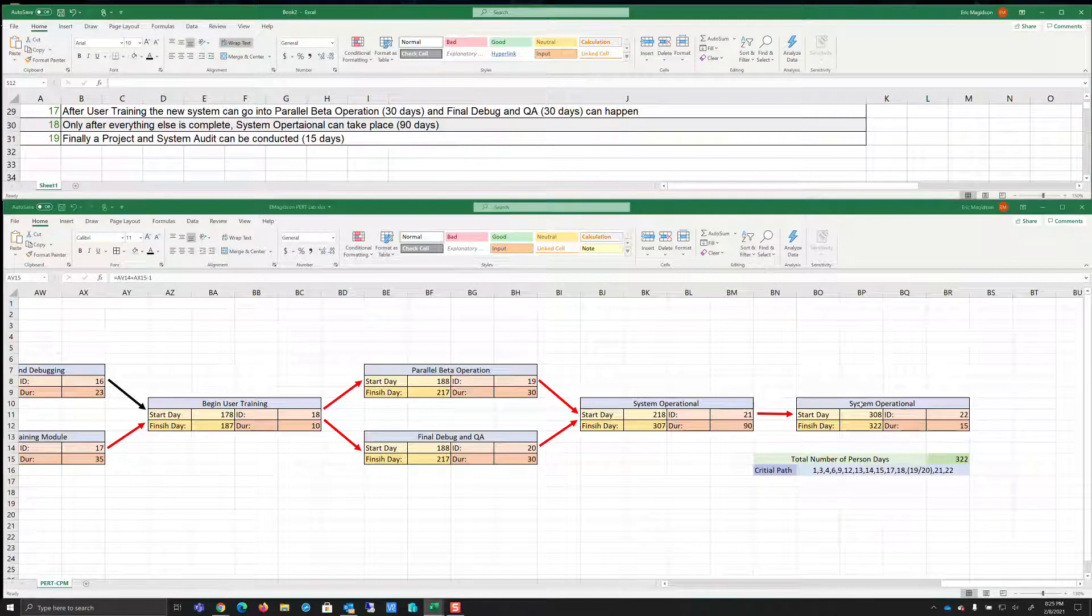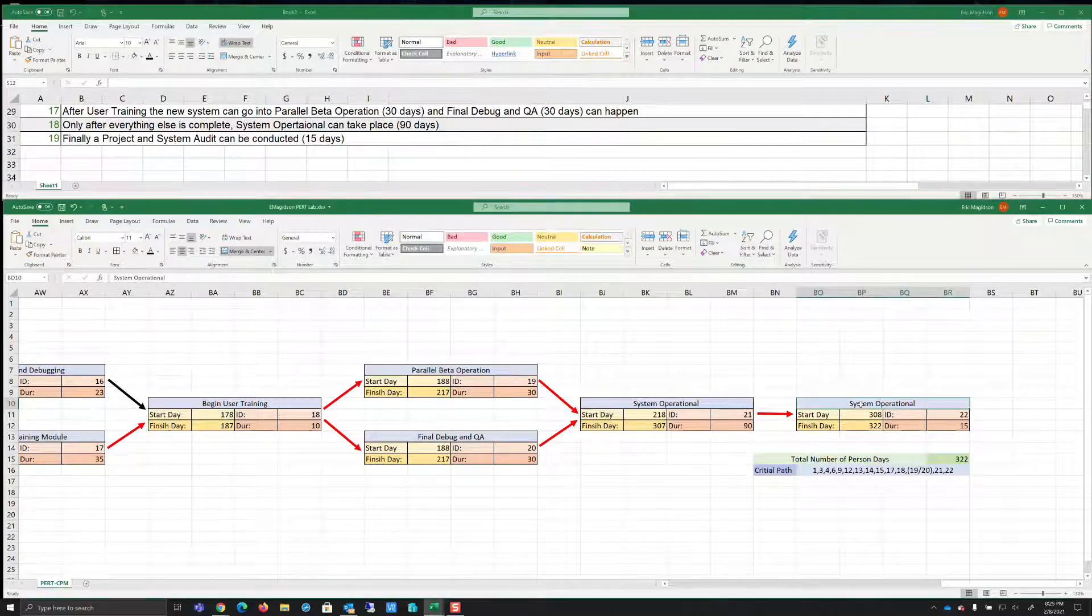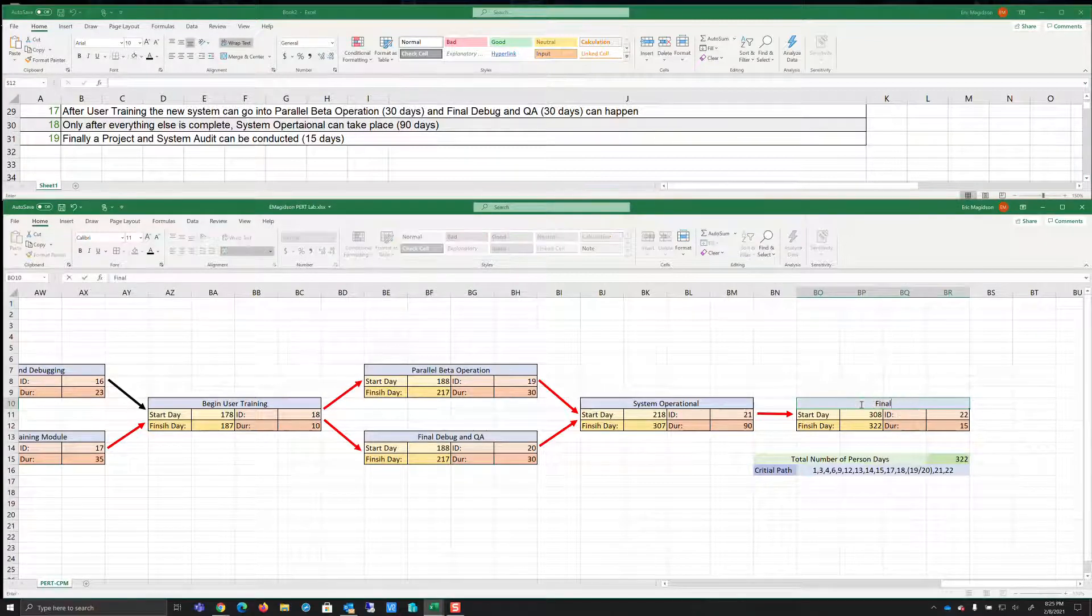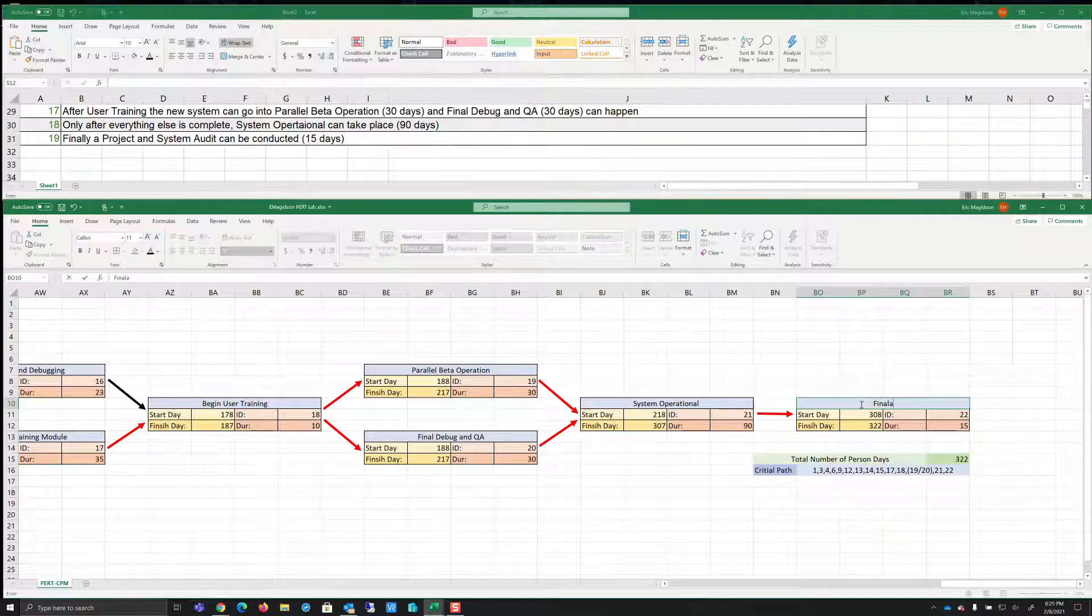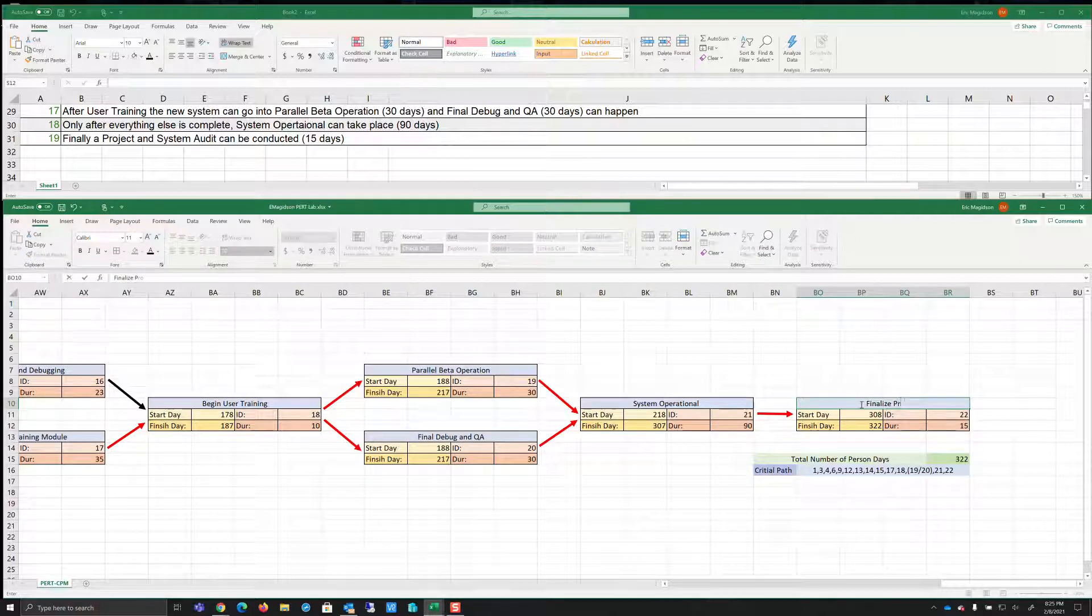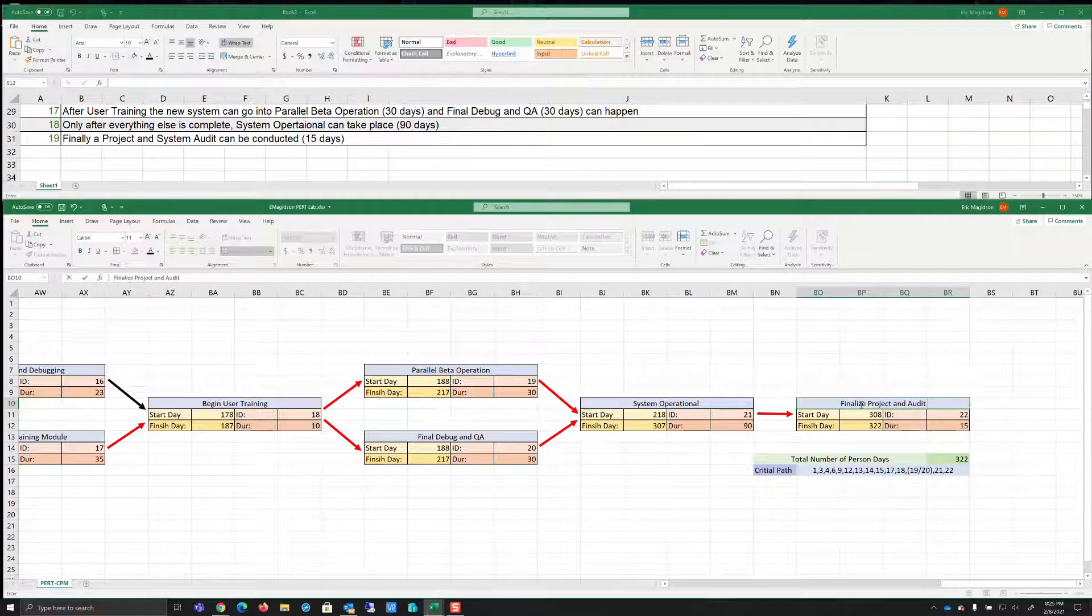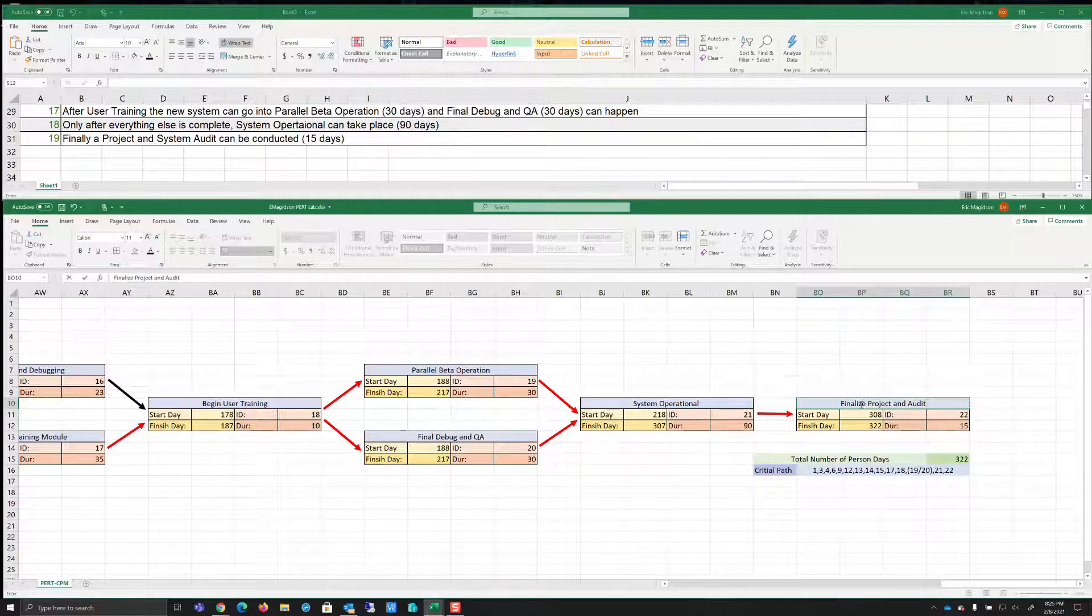So system operational, this should actually say finalize project and audit. An audit project. So there we are. So we can see that here our finished day or the longest time, our critical path, which is the longest time through our project is 322 days.